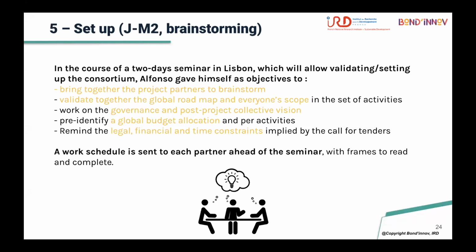So to identify also the global budget allocation between the different partners and remind the legal and financial constraints, time constraints implied by the call for tenders. So a work schedule is sent to each partner ahead of the seminar with a frame to read and complete, because 2 days is not really very long to work on such a project. It is always needed to send the documents before the meetings.